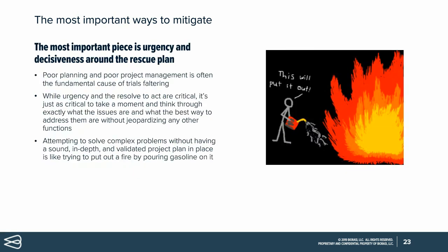The first thing that really should be done if you do have a need for a rescue or a major intervention in the study is to develop the plan, the rescue plan. This is so important, because a lot of the time, the whole reason why the study is not going well in the first place is because there was a lack of planning in the beginning. So the last thing that you want to do is rush out and bring on a bunch of different strategies, and then not have plans around implementing those strategies, right? That would be like pouring gasoline on the fire.